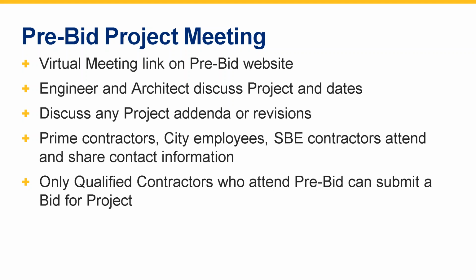All the attendees will share their information. Right now they're virtual meetings, and that list is sent out to all the attendees. And it's important to know that only qualified contractors who attend that pre-bid can submit a bid for that project as a prime contractor.